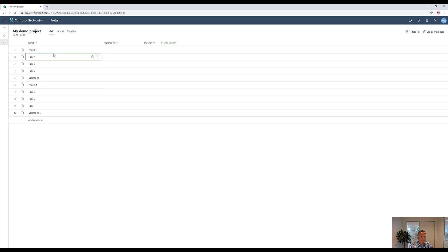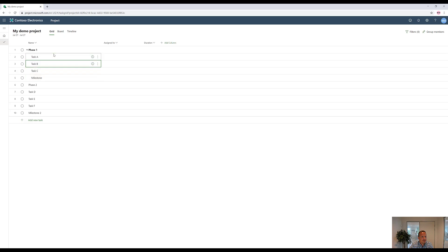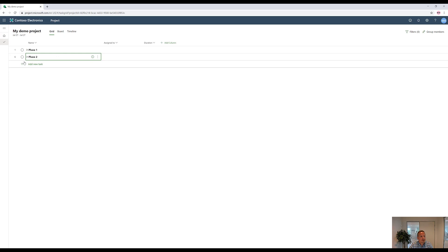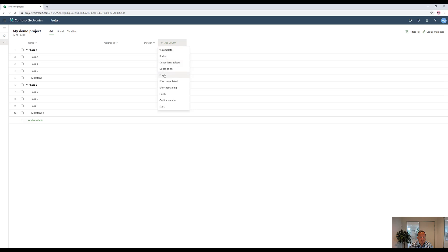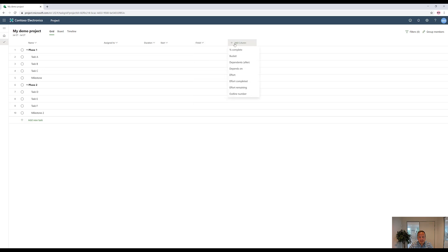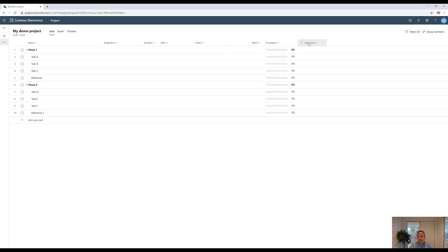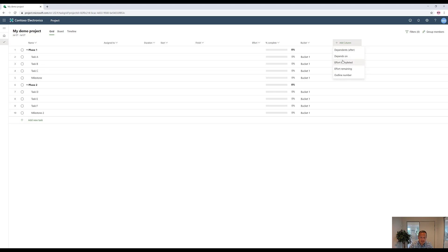Next, we can indent and outdent our tasks to really break down into a WBS structure the tasks. Then we have a phase one we can group on and a phase two. The next thing we can then do is to go in and add people to the tasks, set duration as well and add more columns. Columns could be something like effort or start date, maybe a finish date, and then maybe also the effort, so the hours from this task, and then percent complete and maybe the buckets. In the near future, you'll be able to also have custom columns up here.